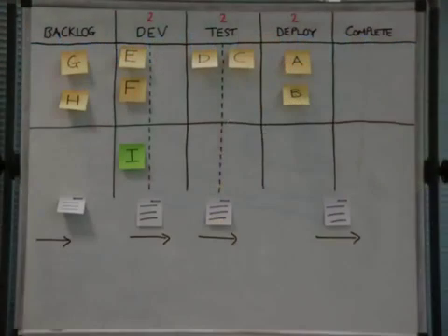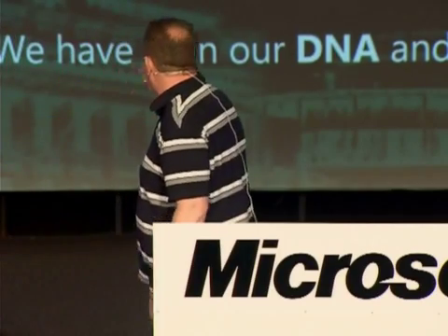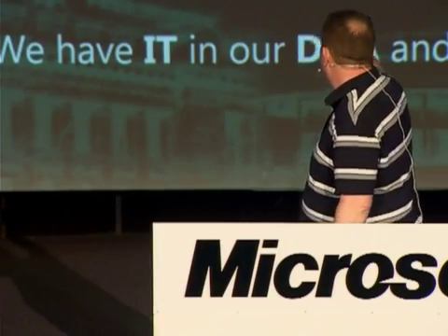If he was balanced across 2 projects 50% of the time, then you can have a lower WIP limit on each project. I've seen that done, with an explicit policy about when he's going to work on things. So it comes back to that, see on the bottom, the second policy along, what controls when a developer pulls stuff off the backlog? That policy is defined. So if he works on a Monday, Tuesday, and a Wednesday morning on one project and the other time on another project, then it could have that clearly on the policy. And then it becomes a capacity management issue.